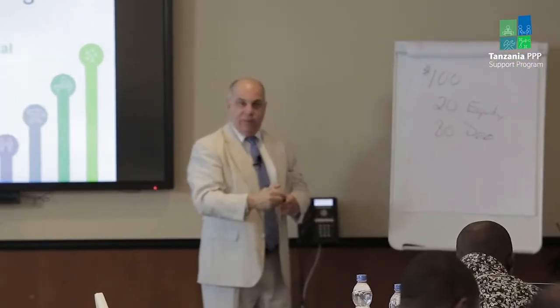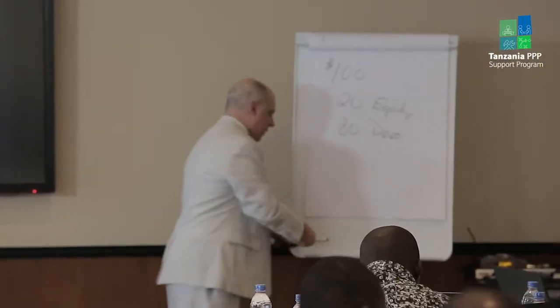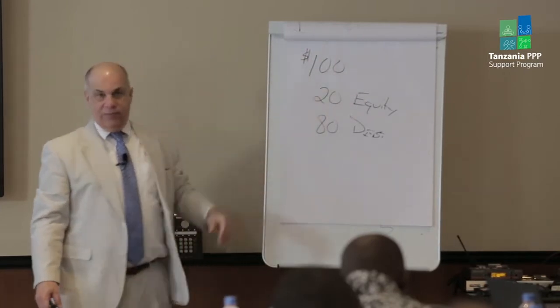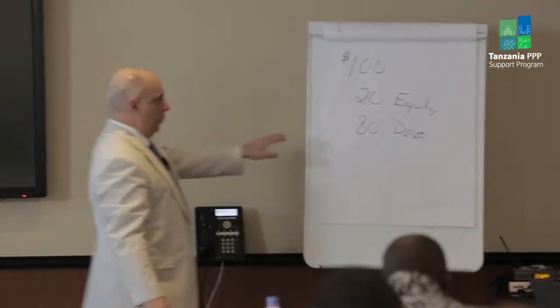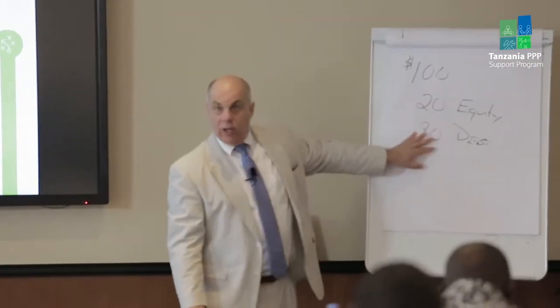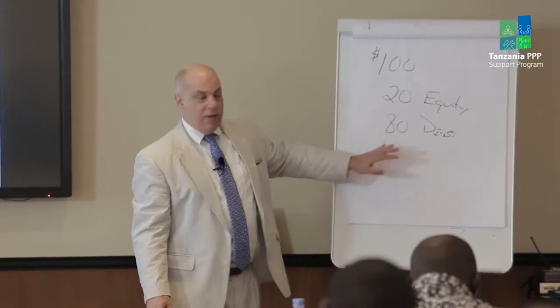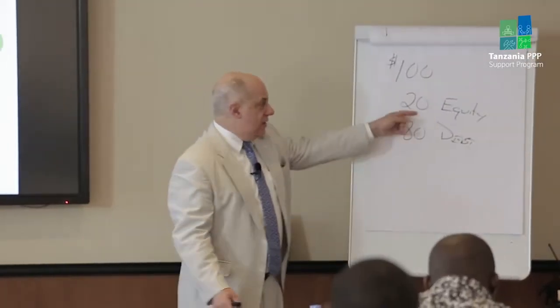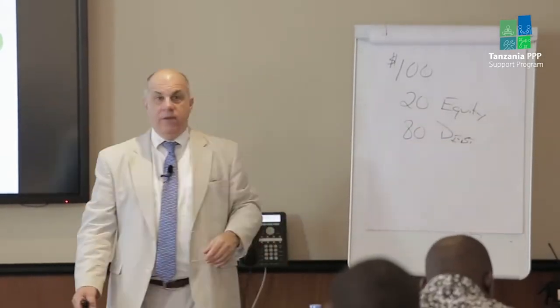So what you just described in terms of a project is, let's say we have a project that's worth 100 million US dollars. And we have 20 million of equity as part of it. We have 80 million of debt, a loan or loans, okay? Oftentimes you'll hear the phrase that this is referred to as the capital stack, right? This is what goes in to fund the project, all right? And these things are financing, okay?